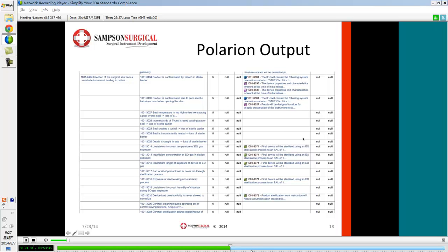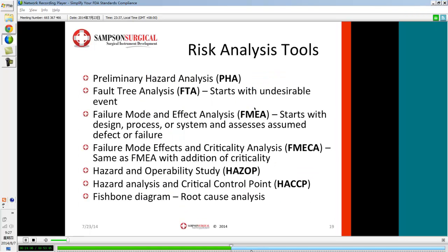It's a harms-down approach. Now, harms-down approaches are typically when you start with the fault, where this is what goes wrong, and what are all the things that can cause that thing to go wrong. That's typically known as a fault tree analysis. So the progression that we have in the final submission is really more of a fault tree analysis progression, where you're starting with the harm, hazards, mitigations. But there's a whole bunch of different risk analysis tools. And the reason we selected that progression is because really that's what the regulatory bodies are looking for. They're looking for a harms-based approach.